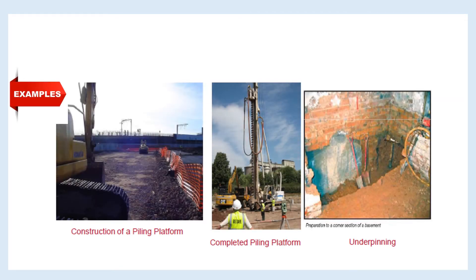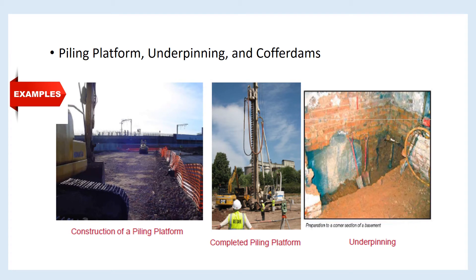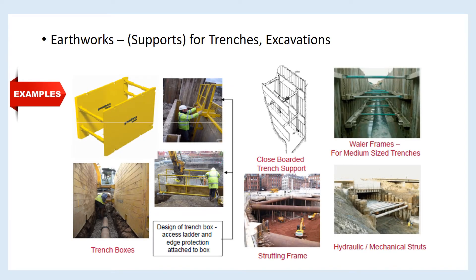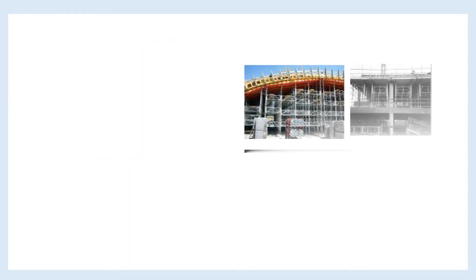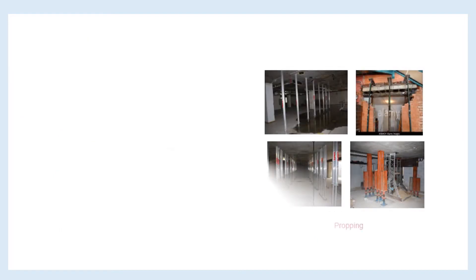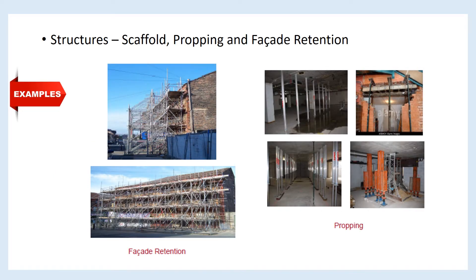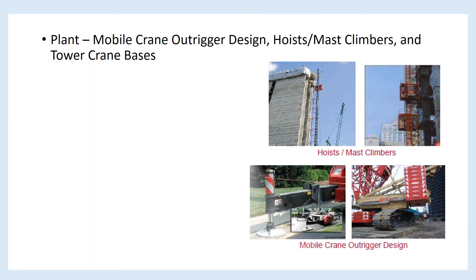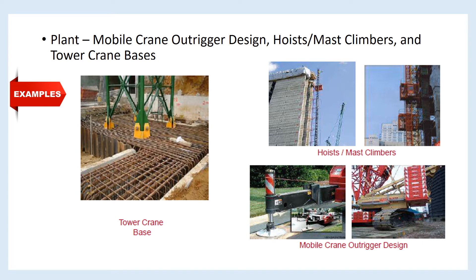Here are examples of temporary work with pictures: 1. Piling platform, underpinning, and coffer dams. 2. Earthworks as supports for trenches and excavations. 3. Structures as formwork and falsework. 4. Structures as scaffolding, propping, and facade retention. 5. Edge protection, loading bays, temporary bridges, hoarding, and signage. 6. Plant as mobile crane outrigger design, hoists or mast climbers, and tower crane bases.